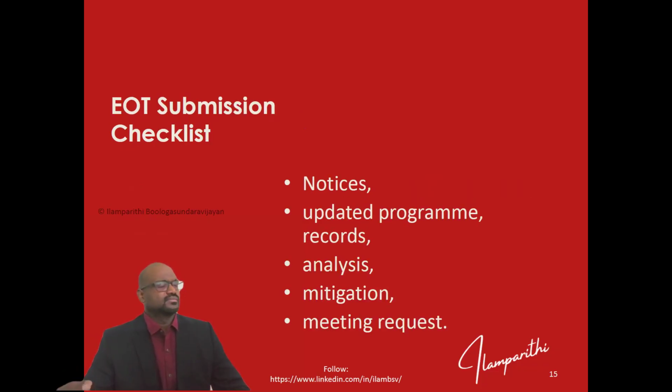So this is a very easy checklist for EOT, but we have to go for the detailed checklist which we have shared earlier. The mandatory items are notices, updated programs, records, analysis, a delay analysis or disruption analysis, mitigation efforts, and then it must have a meeting request.